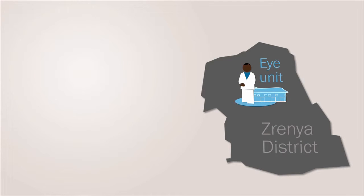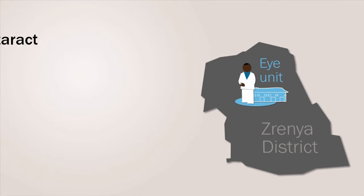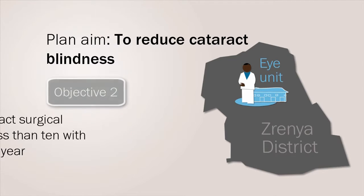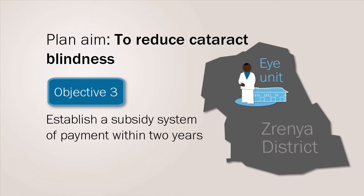Zrenia eye unit has developed a plan which aims to reduce cataract blindness in the district. The plan has three key objectives: increase cataract output by 150 surgeries each year; improve the outcome of cataract surgeries so that less than 10 surgeries have an outcome of less than 6/60 within a year; and establish a subsidy system of payment within two years.